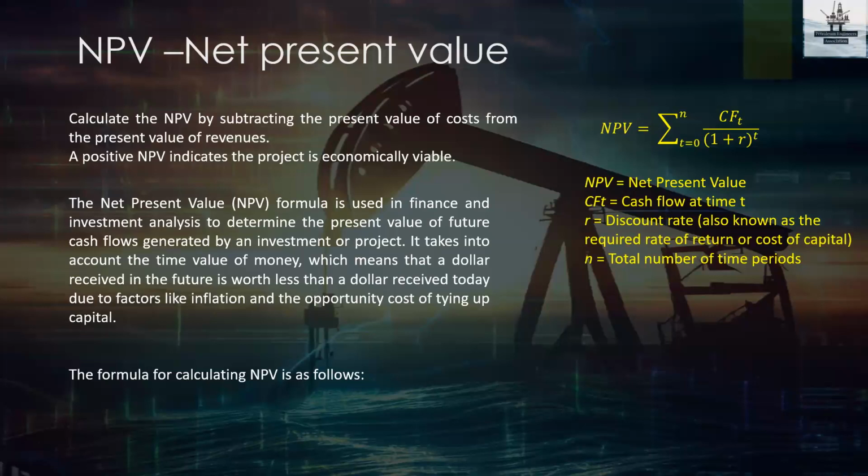This is dependent on the percentage of discount. Every year we will be predicting a certain discount percentage. Based on that, the value of your future income is estimated, and definitely it will be less than the amount you are getting today. If you cumulate all the values, then you will get NPV. You invested in a project of some bulk amount, then you will get outcomes of this project in each and every year. But the value you are predicting today will not be the same. It has to be adjusted with the discount percentage, and based on that, the value will reduce for every year.